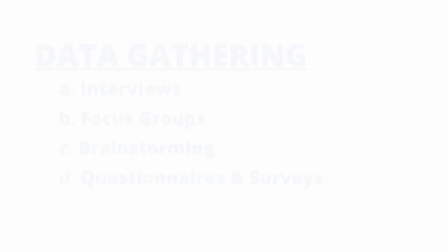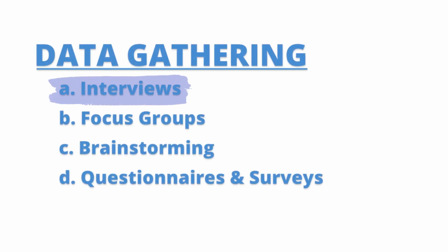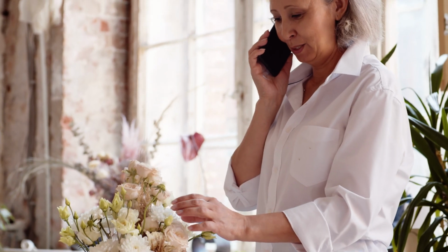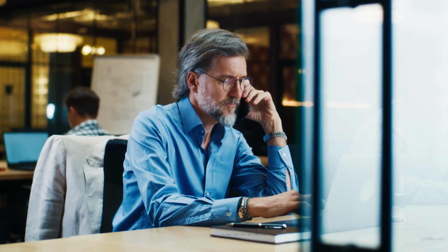So that is one of the methods that you can use under the data gathering technique. Another method is doing interviews. Instead of doing questionnaires or surveys, let's say you have access to some of the stakeholders, you can call them for one-on-one interviews and find out from them, hey, we want to do online shopping, what's your take? Ask them various questions, some open-ended, some optional, and get them to respond. Through that, you're getting what their requirements are.